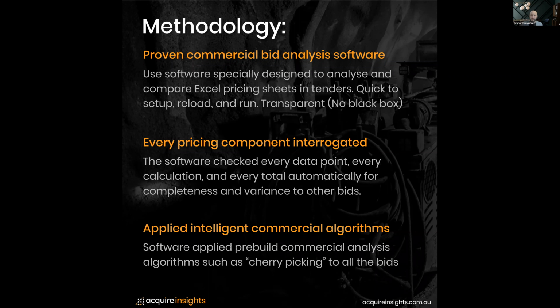The second point was we wanted to make sure every pricing component was interrogated, because there were so many pricing elements. They wanted every single point checked, and doing that by hand, with 1,000 data points or 5,000 calculated fields, multiplied across 6 different bids, gives you 6,000 or 30,000 data points to review.